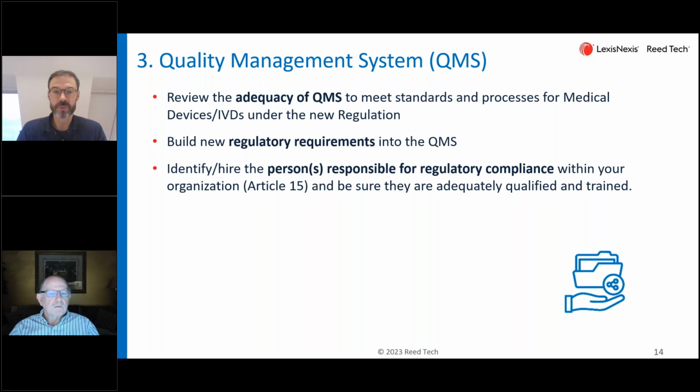Then of course the option now is that you need more and you need to be able to show that you're in compliance. That's the only manufacturers I see where they use it for changes, because just doing the change or the update to your existing system is a big thing. And if you upgrade, let's say, the technology behind it, I would say it's actually two projects, which I would prefer from a risk-based perspective to decouple.